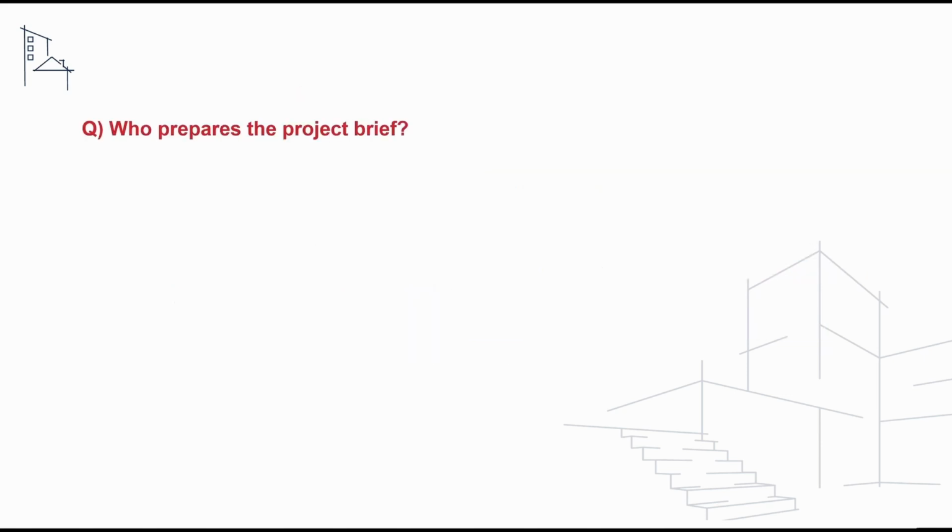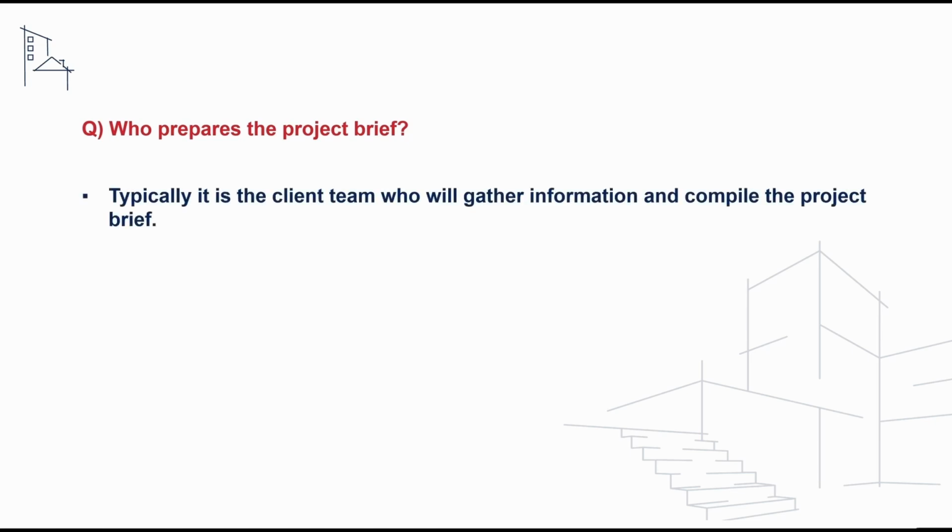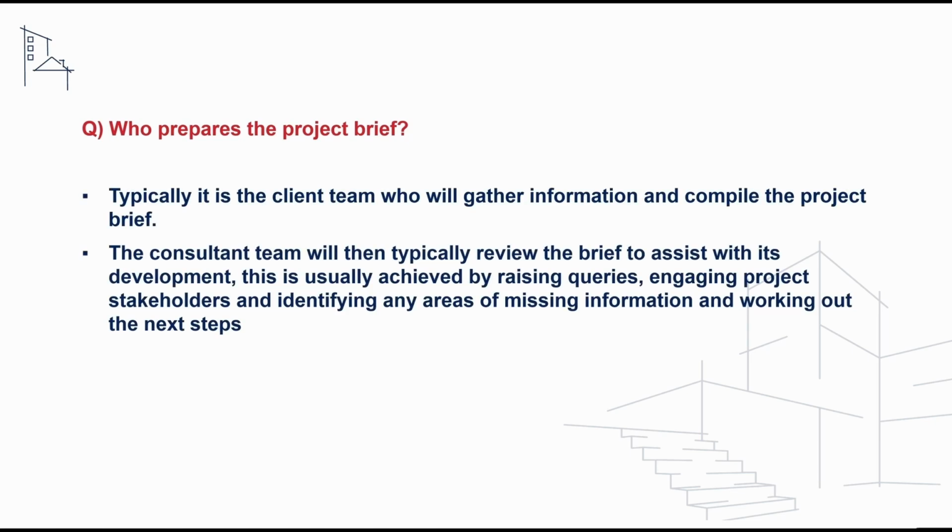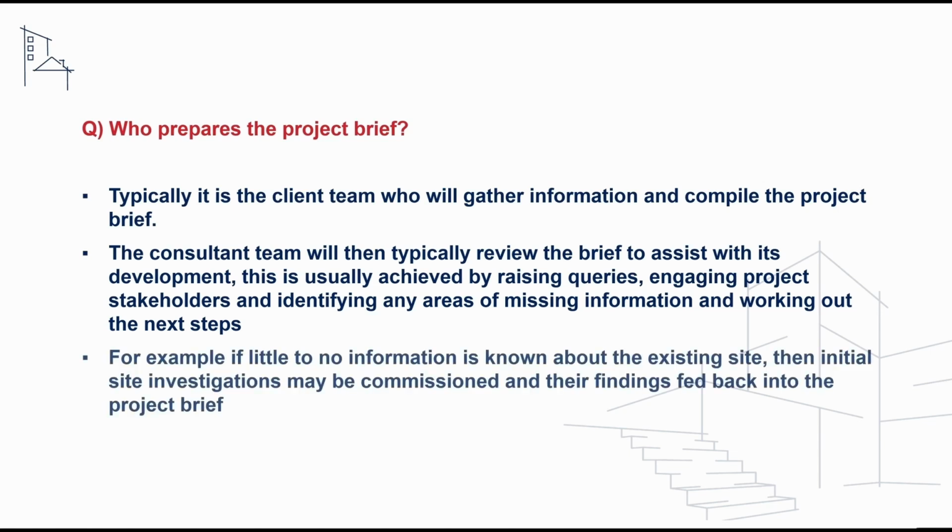We may also be asked a follow-on question on who prepares the project brief, and typically it is the client team who will gather information and compile the project brief. The consultant team will then typically review the brief to assist with its development. This is usually achieved by raising queries, engaging project stakeholders, and identifying any areas of missing information and working out next steps. For example, if little to no information is known about the existing site, then initial site investigations may be commissioned and their findings fed back into the project brief.